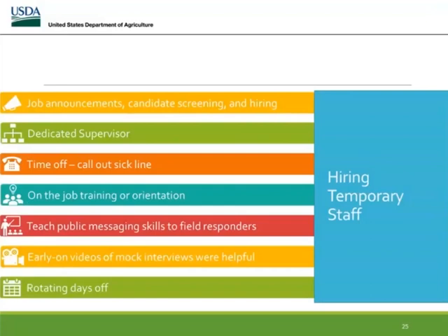One of the biggest questions I always get is, how do we get all the work done? One of the ways is by hiring temporary staff. One of the best things that we did was having the job announcement, candidate screening, interviews, and hiring all done by personnel who were not assigned to the incident command post, so we did not have to take the attention away from our incident management team to look for candidates.